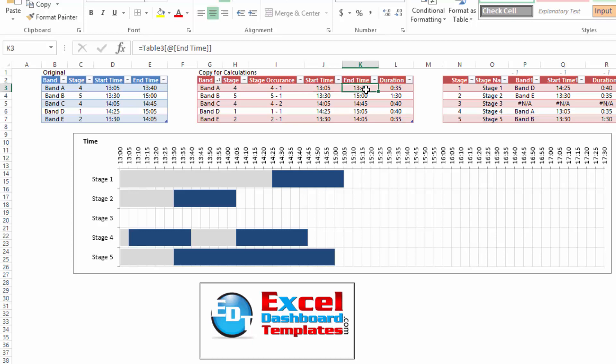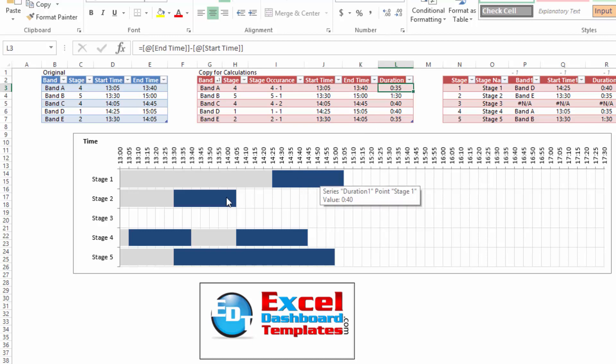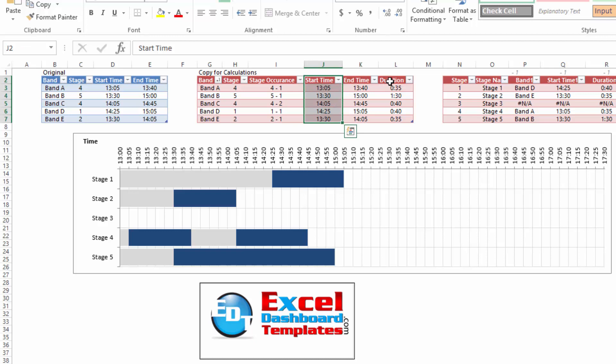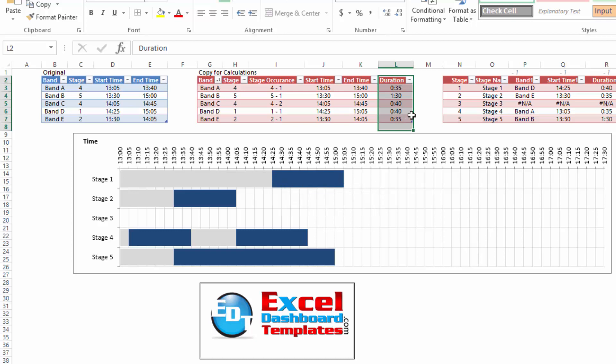Next, we just have the start time, end times and then we really need to calculate the duration. That is the end time minus the start time. So that's 35 minutes and the duration is what's going to give us this blue part of the Gantt chart right here all throughout there. So that's important. When we create our chart, ultimately what we're going to do is we're going to chart our start time. We're going to tack on to that the duration and so you can see we don't need to know the end time in the chart at all. We're going to chart the start time, which is the gray part here, and we're going to tack on the blue chart for the duration.